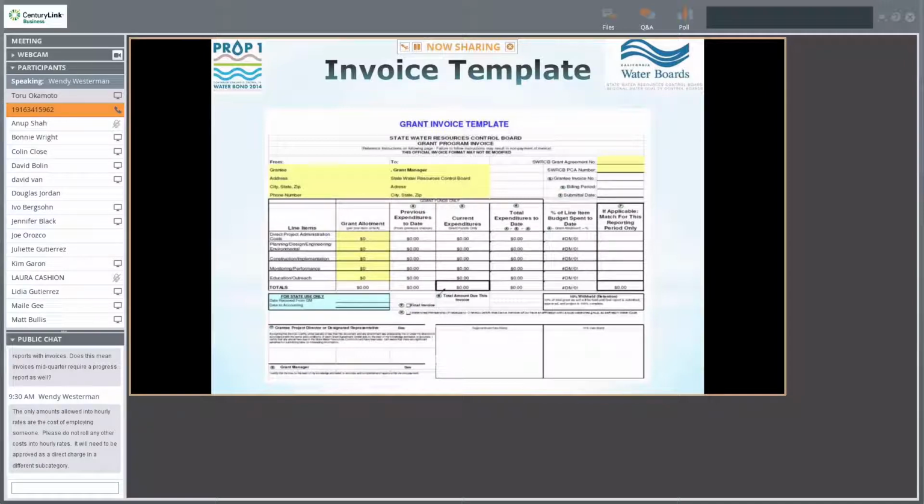Yeah, if they want to collect those charges that they're considering indirect, we may not consider those charges indirect. I mean, it costs people money to implement these projects. So work with your grant manager and your analyst, and we'll figure out if some of those charges we can reimburse you, but it just will not be rolled into your hourly rate. It will be a subcategory, a different line item. Okay, that makes sense. Great.